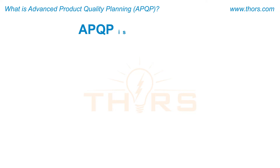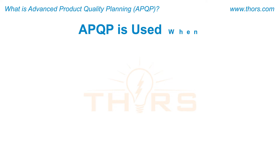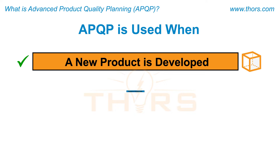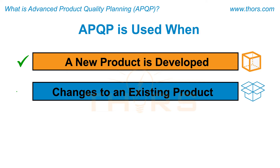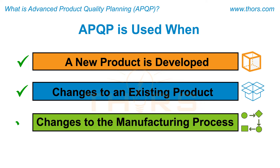APQP is used when a new product is developed, when changes are made to an existing product, or when changes are made to the manufacturing process.